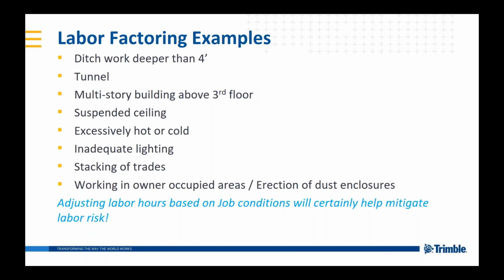Multi-story buildings above the 3rd floor. Now, you might argue that working above the 1st floor would probably take some type of factoring, but that's cool. If that's what is in your basic assumptions, then that's something that you would note. So anything above the 1st floor would then require some type of a labor factor. Now, you would also argue that once I have my material on the floor, I should be able to install it on, say, the 4th floor just as quickly as on the 1st floor. I agree with that once the material is already there, but certainly it takes extra labor to get the material up onto those additional floors. So that's where you would apply some type of a correction factor.